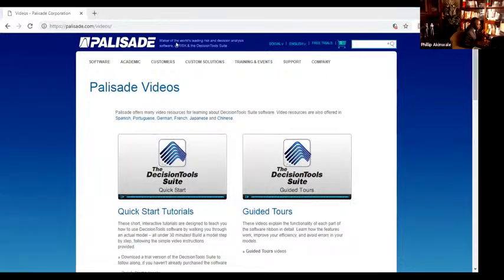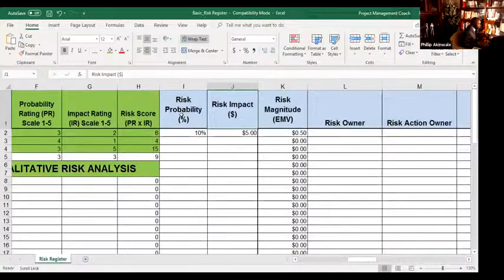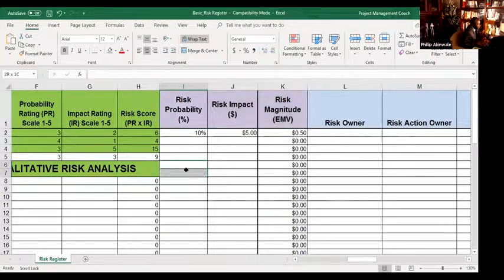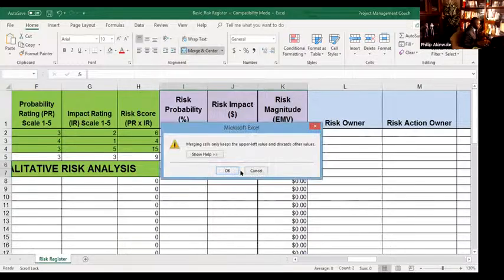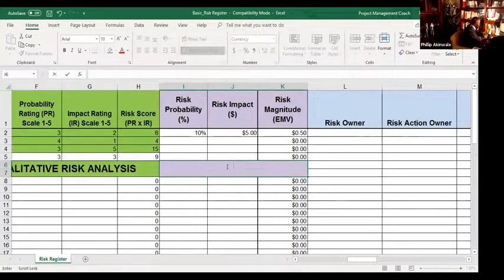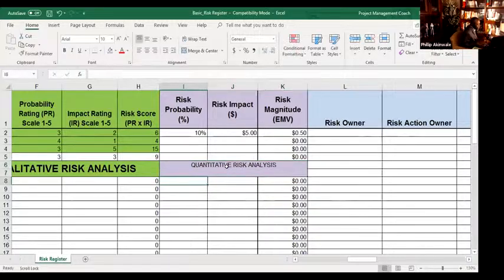But the reason why I brought this up is because in the real world, a lot of people do not do real quantitative risk analysis. They run away from it because they don't want to deal with numbers in front of management. They hate telling management the impact, the aggregate impact. So this is where quantitative is different from qualitative. Quantitative looks at the entire project. Aggregate. What is the aggregate effect of all of these risks on the project? What is the outcome going to be when all of these, or if all of these risks hit the project at some point? That is the key distinguishing factor.